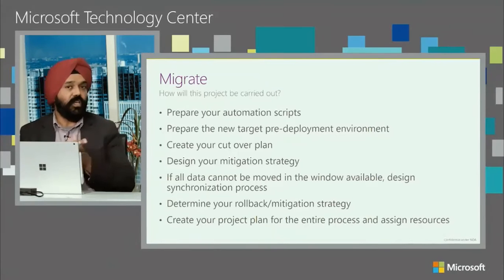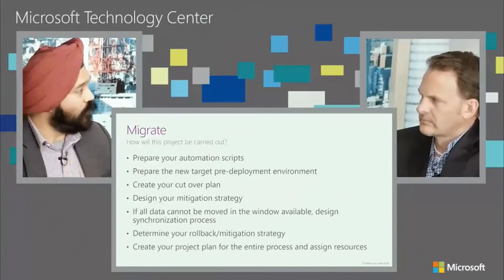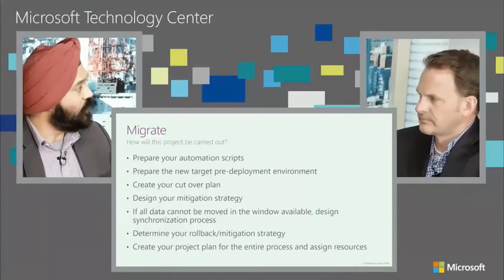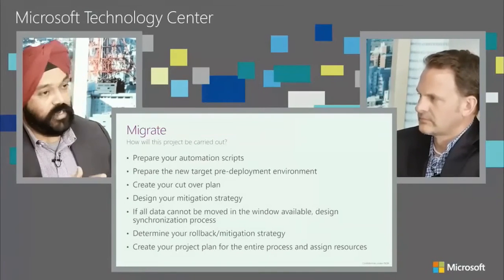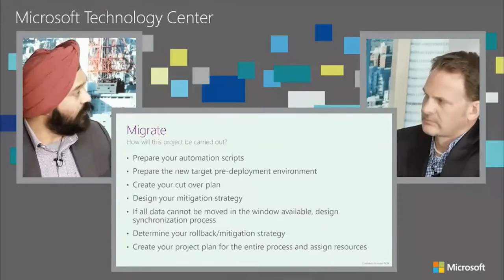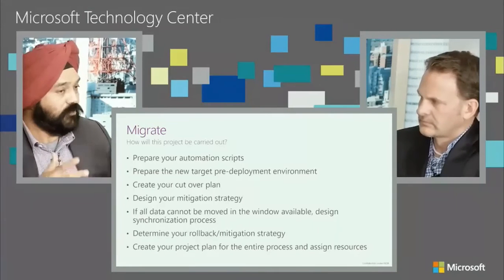And Kevin, this is where we see a lot of customers struggle because oftentimes the application owners or the DBA group might lead a migration. But when it comes to the actual final deployment, you really need support from the infrastructure team, you need the support from the application owners, the business owners, and everybody has to be involved and informed about the process. So it's very, very important that you have the key stakeholders identified and a very robust project plan in place to kind of plan this out.